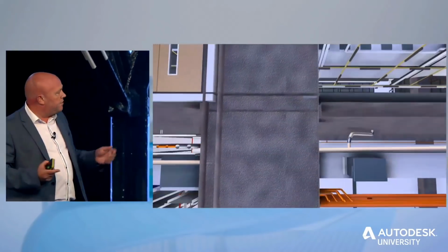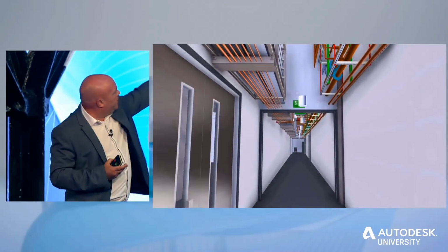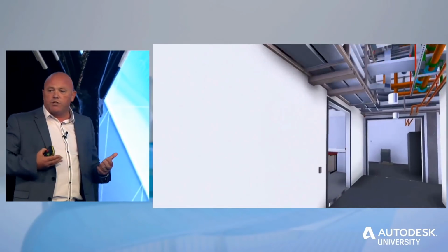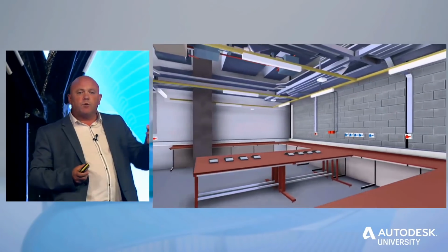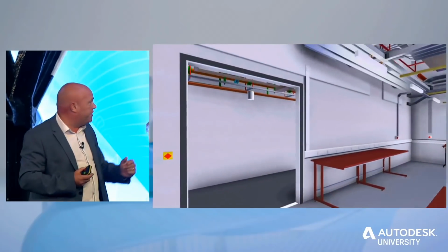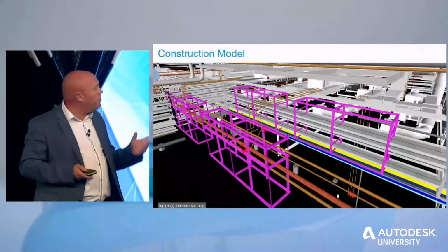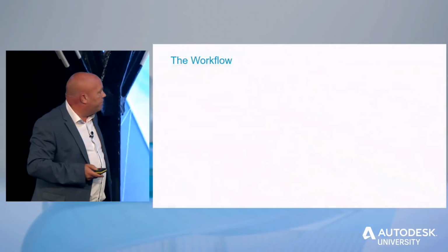Because we've got confidence that all the services in the building will actually fit in now, we can take these, as you can see here, the frames on the left-hand side of the corridor. We just took the Arup model that Bailey's had worked with them on, and we're putting a steel frame around it, which is going off to their fabrication shop over in Bradford. And it's given us confidence that when these modules are delivered to site, they will actually fit on the project itself. And you can see here, there's some more modules there, etc. So we have to make sure that the modules that we were bringing in could fit. And it was all done, really, through a manual process.